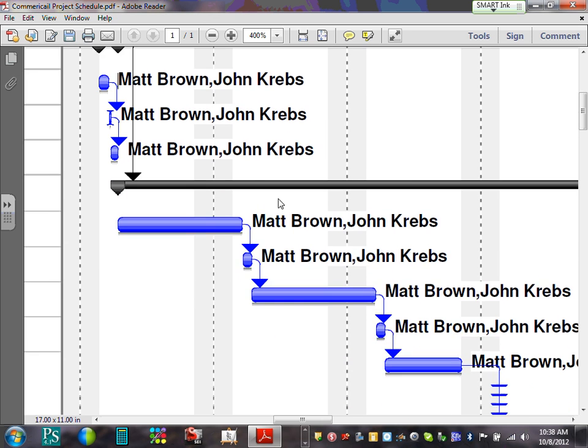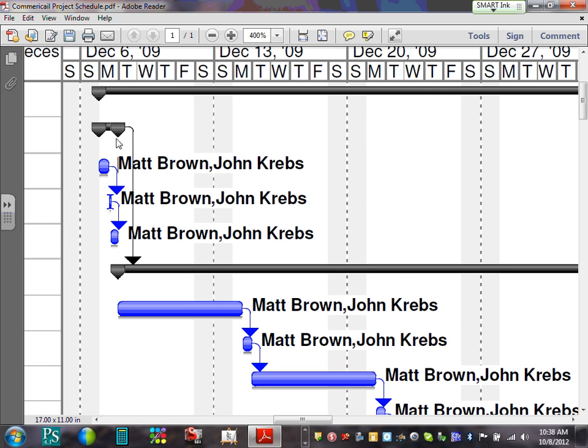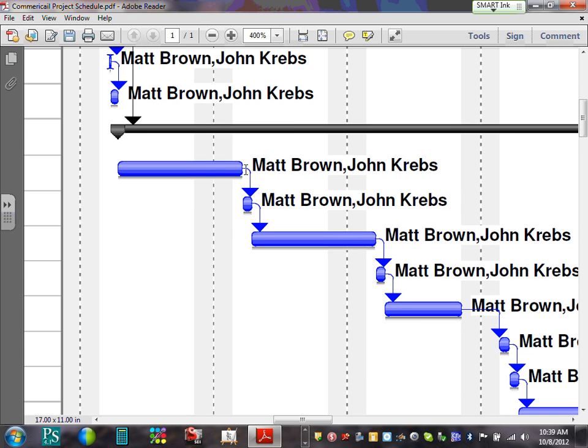All right, this is how the Gantt chart works. You guys are familiar with the Gantt chart. For those of you who are not, are Gantt chart links start to end or start to start? For example, look at this task. I can't meet with the utility unless I meet with the owner first. I have to finish this task to start this task, so they all go start to end. Like, unless you rough in here, I can't put in the receptacle. Everybody knows what start to end or start to start tasks are.